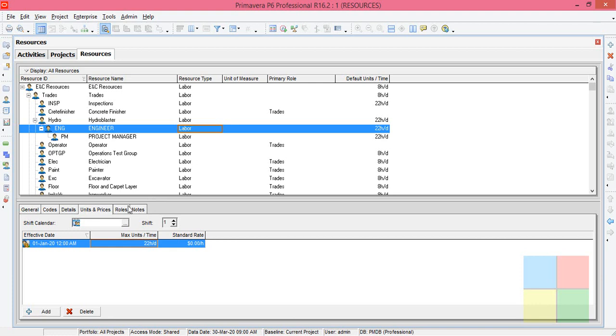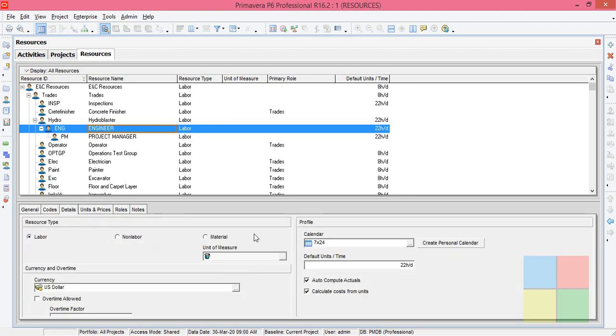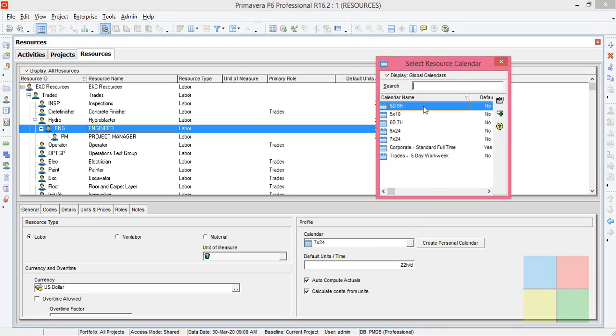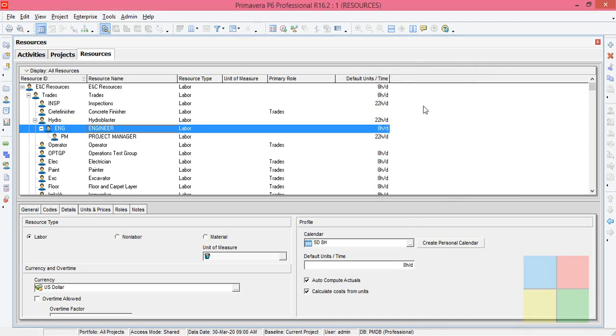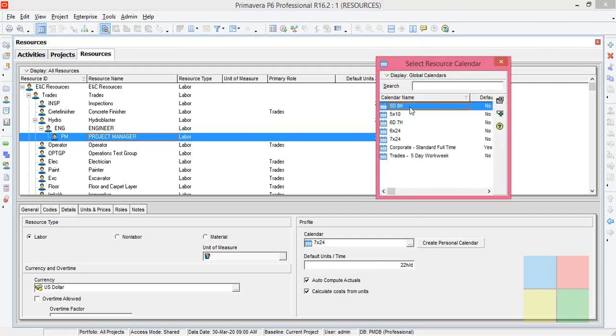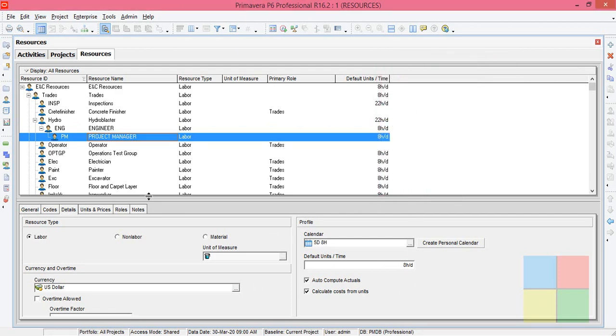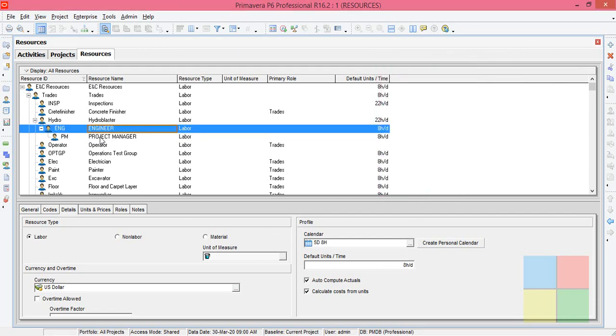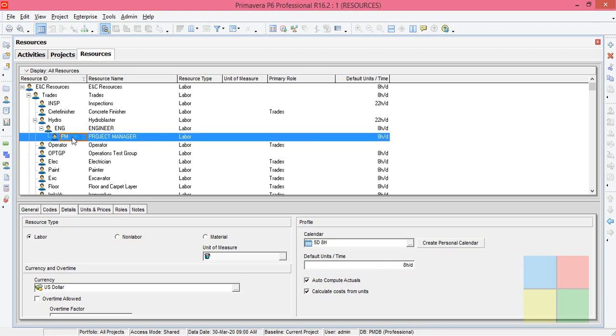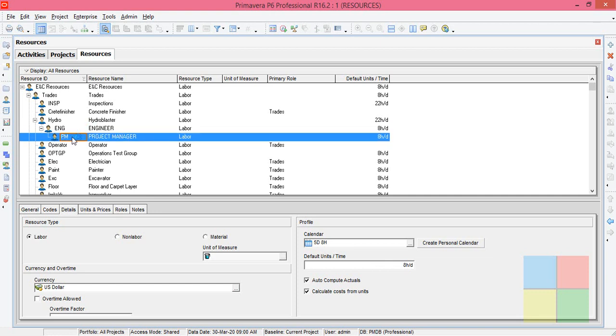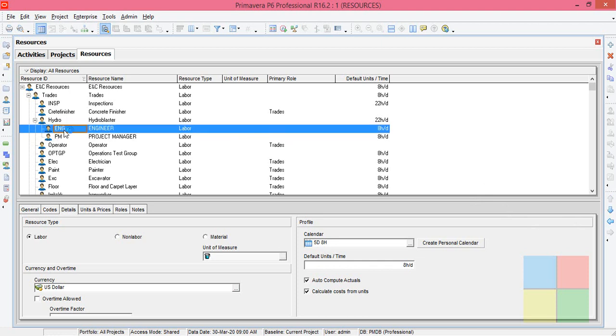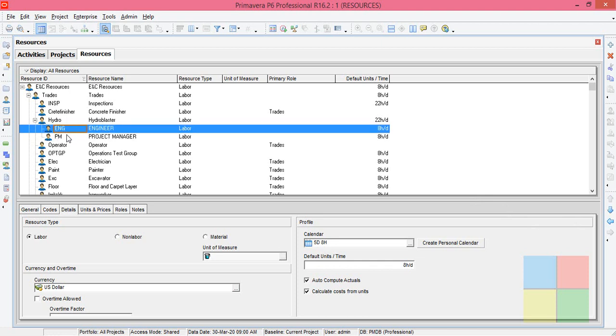Let's come to the resource details. Highlight engineer, click on details. Since we use 5 day for the project, even for the resource we have to go with the same calendar. For the project manager we'll go with the same calendar. We'll change its order second one. They're like parent and child relationship.